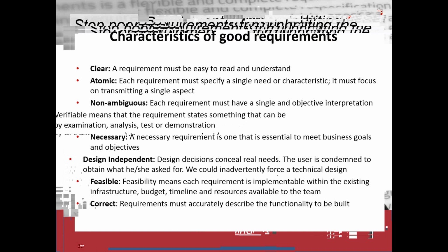The requirement must be correct, and for that, of course, the user or the customer is the one that is going to verify the requirement. But we must be sure that the requirements are correct, especially true for requirements including formulas and calculations. And finally, the requirements must be traceable to other requirements, to tests, to the user that asked for the requirement, or to the customer, to maybe use cases, to design, to the codification, and so on.